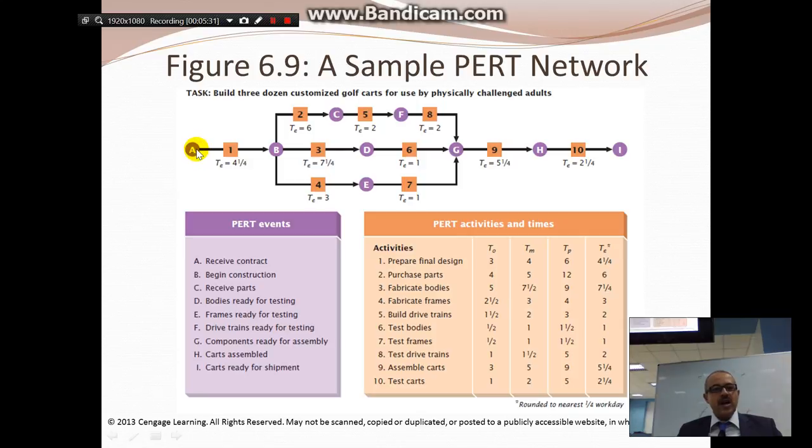So this is A, where we are, and this is number one, what we do. Once we finish this, we start to have three different routes. But once we all reach G, it means all the components are ready. Where did we get the components? From the bodies ready for testing, from E where the frames are ready for testing, and from here where we receive the parts. So here we made the body, here we made the frame, and here we made the parts. Then at point G, we have all the components ready, and then we assemble them and ship them.